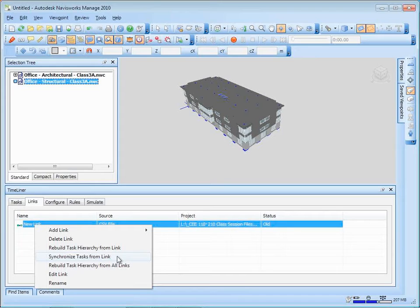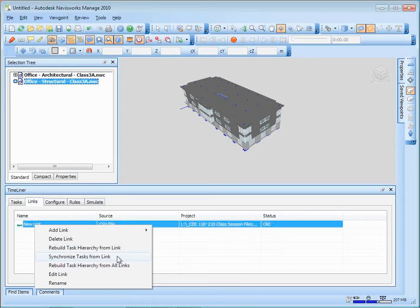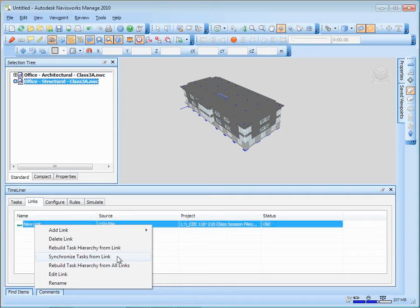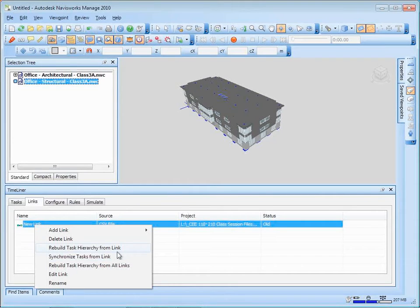If I rebuild the tasks from the link, what it's going to do is go through and look at the linked file and all the tasks, it'll go through and create new tasks based on what it finds there. So if you have new tasks in there, you've added tasks, do a rebuild because that'll pick up all your new tasks. If, on the other hand, you just have the same list of tasks and you change some of the values, like you change the start or end date or something like that, don't rebuild, just do a synchronize. Either way, it kind of gets you to the same place, but synchronize is a little softer, gentler. It won't recreate the entire list. It'll just go through and change the information on the different tasks. But to start with, let's do a rebuild.